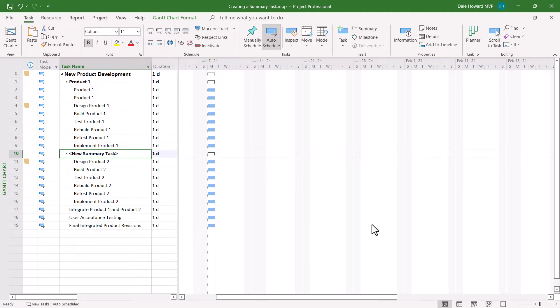Look what Microsoft Project just did. It inserted a new dummy named summary task and it automatically indented the selected tasks to make them subtasks of the new summary section.